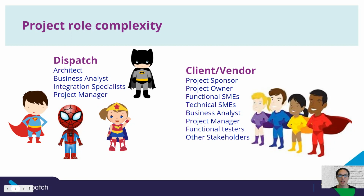On the client and vendor sides, we'll also need a project sponsor to champion the project and the process changes it will likely bring, a project owner with decision-making and sign-off authority, resources with functional knowledge of the systems and processes being automated, and the technical know-how to make the necessary configuration and development changes, business analysts and project managers, functional users to conduct tests to ensure all use cases are validated before the solution is deployed to production, not to mention other potential stakeholders across the organization.